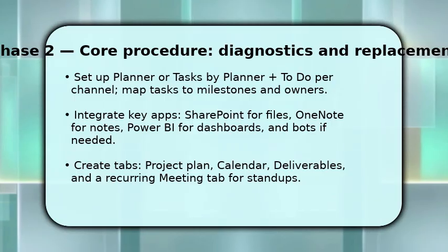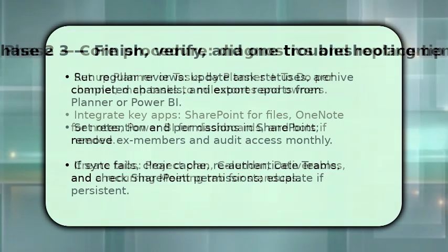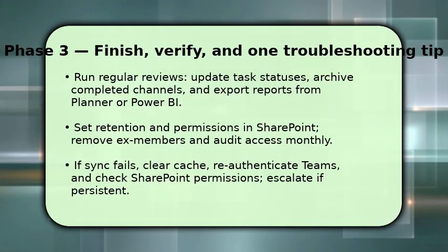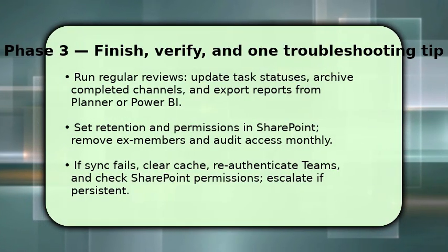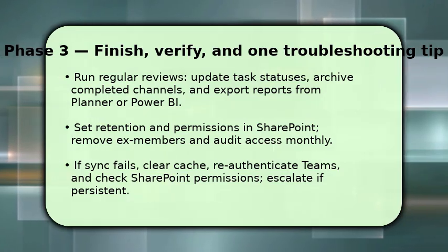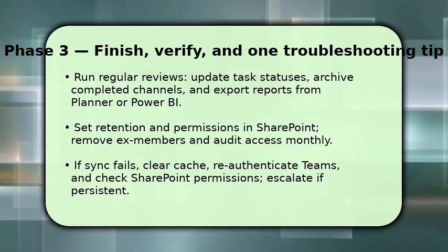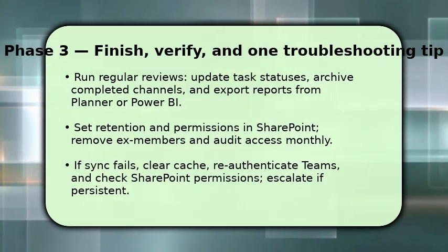To finish the project cleanly, run regular reviews. Update task statuses, close or archive completed channels, and export Planner or Power BI reports for stakeholders. Then set retention policies and tighten SharePoint permissions before removing ex-members. This preserves records and prevents leaks.